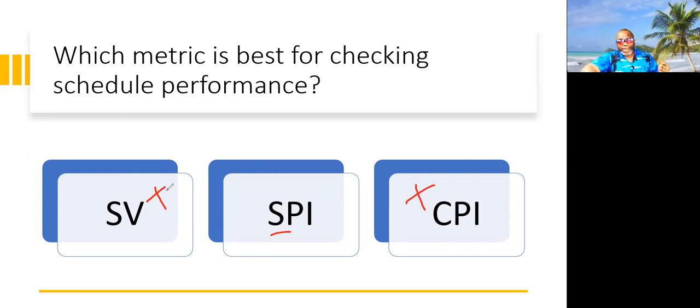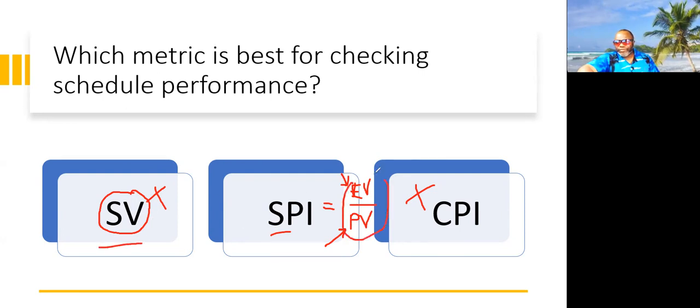But again, it's not in comparison with anything that has been necessarily budgeted in total, or in comparison with the schedule performance. So remember, the schedule performance index is the earned value, which kind of holds the performance in some way. But when you juxtapose it with planned value, it helps you see the accomplishment in comparison with the plan for what you should have accomplished by a particular date. This just shows you the difference between these two, EV minus PV.